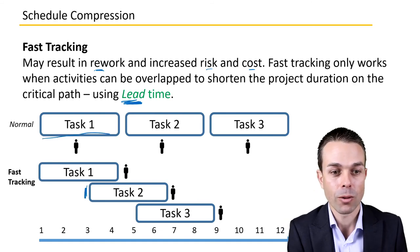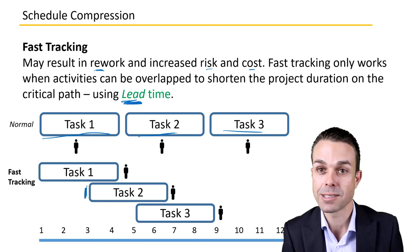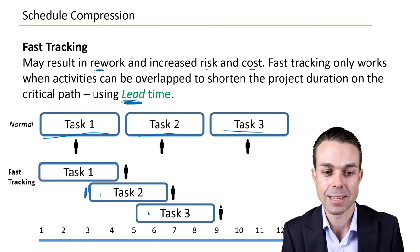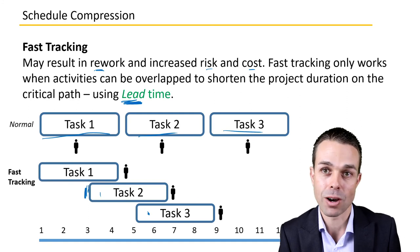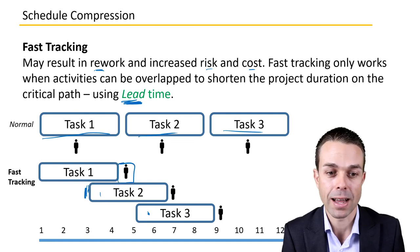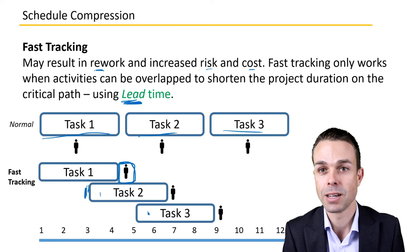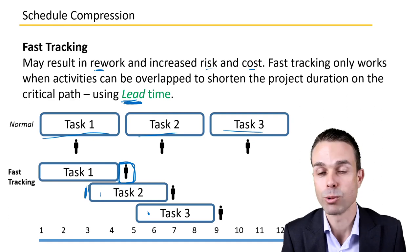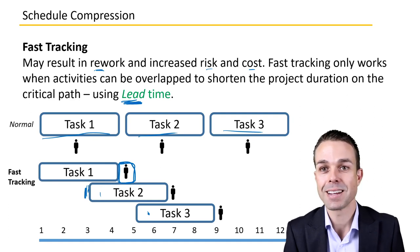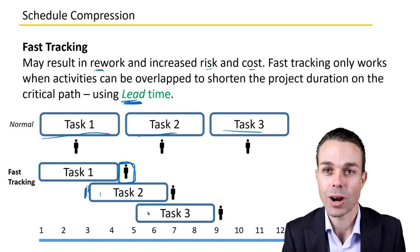For example, tasks one, two, three normally run in sequence, but now with fast tracking we're performing some of these activities at the same time. Because we're able to do that, we don't have to add more resources in this case, so the cost is a little bit less than if we were to crash the project. And that is the idea of schedule compression — crashing your schedule and fast tracking your schedule.